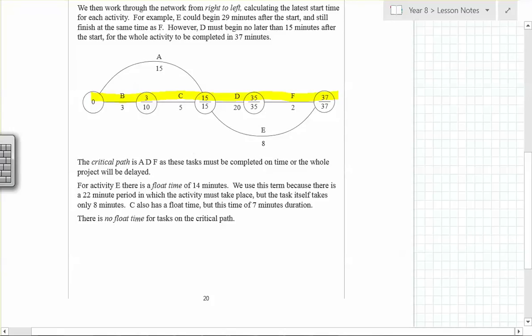So why is it not an 8 there, Archie? Because you do B and C whilst A is happening, and because A is the longest and has to be done before you can bake the cake. Yeah, so the fact that B and C only add up to 8, the earliest possible start time is actually linked to the longest.